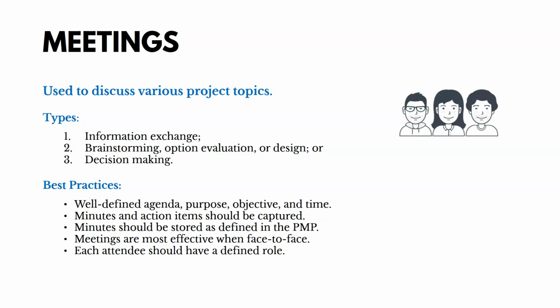The meeting should have a well-defined agenda, purpose, objective, and time. Minutes and action items should be captured. And minutes should be stored as we define in the project management plan. And they say that the meetings are most effective when they're face-to-face. Doesn't mean a virtual meeting can't be effective, but they just say meetings are most effective when they're face-to-face. And each attendee should have a defined role. So they kind of have to know what your role is at the meeting or after the meeting. And action items should be clearly defined. The minutes should be shared. Has to be a reason for why you're meeting, essentially.